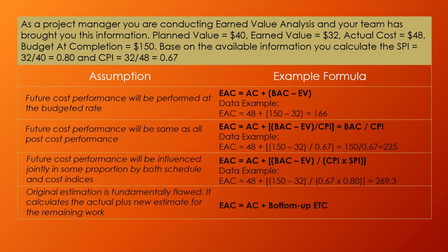This formula is used when the original estimation is fundamentally flawed. It calculates the actual plus new estimate for the remaining work.